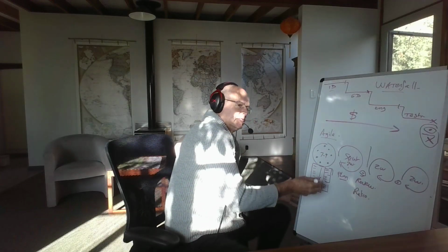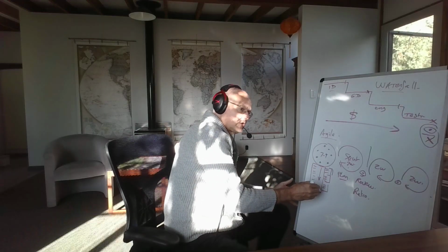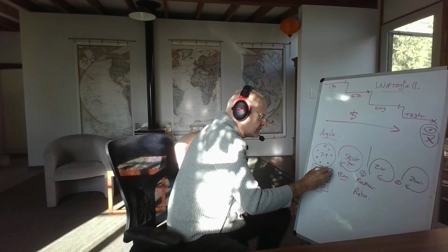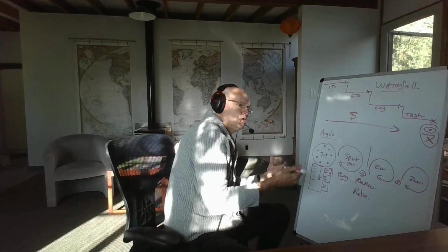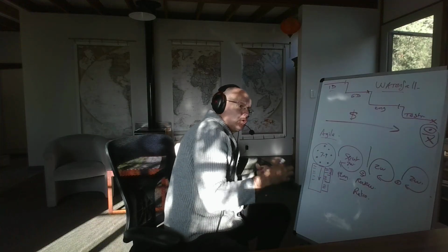So all the great things we want to build in our game, prioritized in return on investment, so value versus cost, and we take the first few items and say, okay, out of those, what do we think we can deliver in 2 weeks' time? And that exercise was called sprint planning.